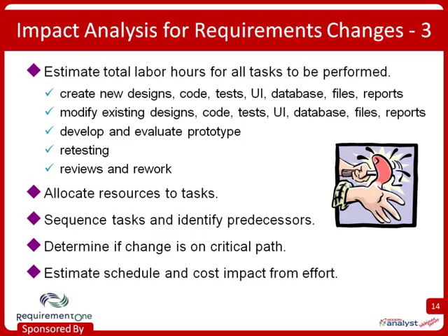So you certainly don't want to spend 2 hours doing an impact analysis for a change request that's only going to take you 1 hour to implement. That's just stupid. But I think you can probably judge what kind of change requests might have a lot of iceberg hiding under the water that is worth looking into before you sail too close to it.